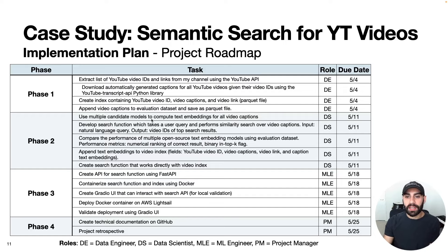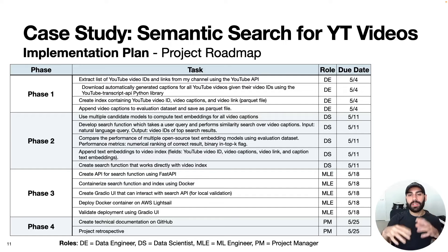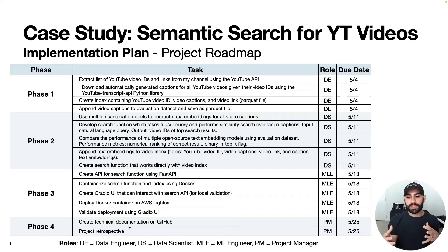Phase one is all the data engineering: extracting transcripts and saving them as a parquet file. Phase two consists of exploring multiple embedding models and testing the search function using the evaluation data set, then creating a searchable video index. Phase three consists of building an API for the search function, containerizing it, testing it locally, building a simple Gradio UI, and deploying it on AWS. Phase four consists of creating the documentation and doing a project retrospective.